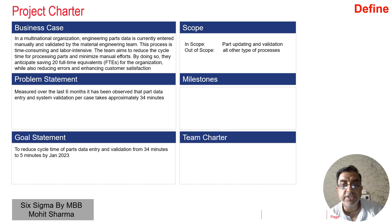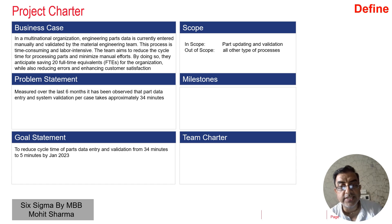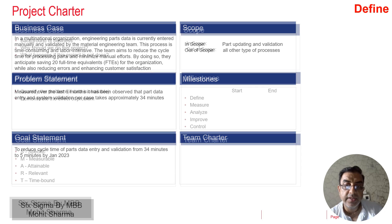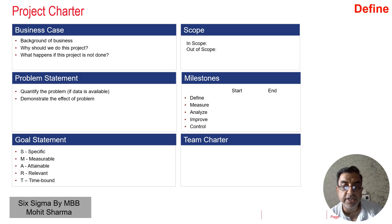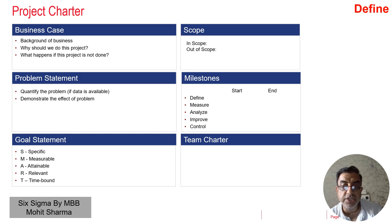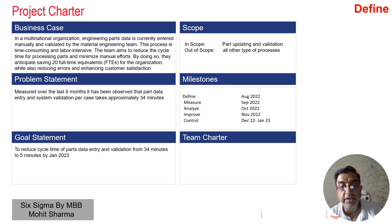The next important element in a project charter is milestones. If you are doing a DMAIC project you have to define the DMAIC milestones — Define, Measure, Analyze, Improve, and Control. You need to identify when you are starting the Define phase and when you are ending the Control phase. In the example we are taking, the Define phase starts in August 2022 and the Control phase will end in January 2023.